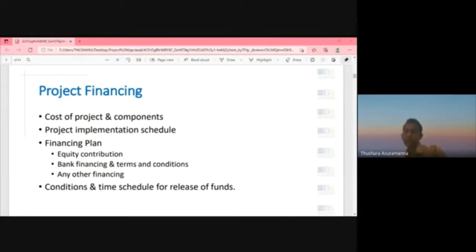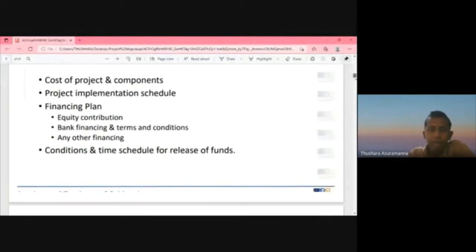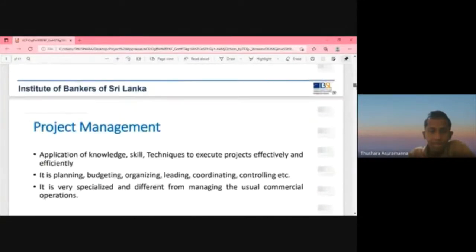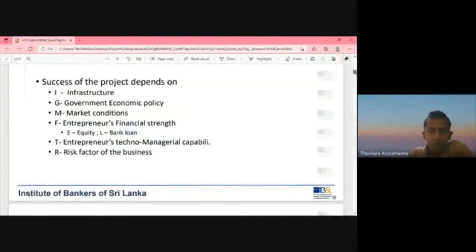Then come to the building. Then come to the other infrastructure, contingency, working capital. Like that, the cost will go up. Then you say, this is the total cost. 60% borne by the sponsor, 600 million, 400 million by the bank. Then we apportion how much, for what areas, like that. So we discuss before starting financing. Any issue on that? You are clear on that?